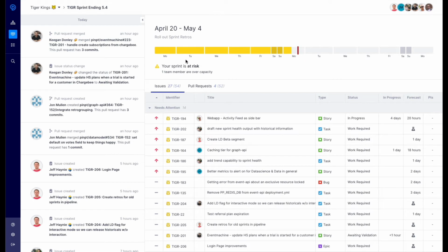Understanding how this breaks down in terms of the actual sprint, we want to showcase capacity for you, so we actually look at the capacity of the team over time and understand when they do the most work, so that if you are a manager or team lead, I can quickly look at Wednesdays and see that 9% of the work for the course of the sprint is going to be broken up to a Wednesday. I see where Tuesdays tend to be our biggest delivery points with 10% of the sprint, Mondays and the weekends certainly following a little bit after that. This gives you a sense of when to expect the bulk of work to be completed during the course of that sprint.